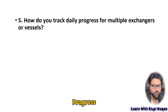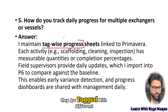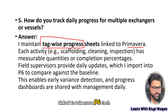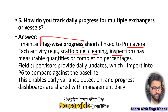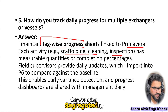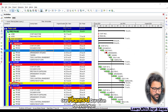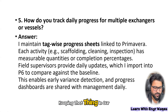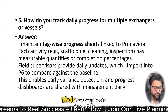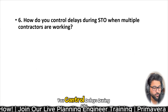How do you track daily progress for multiple exchangers or vessels? I maintain tag-wise tracking linked to Primavera P6. Each activity — scaffolding, cleaning, inspection — has measurable quantities. If there are multiple heat exchangers they are segregated by their tags, and every heat exchanger or pressure vessel has its own planned duration and planned man-hours. Keeping that in mind, we prepare separate Excel tracking sheets for each.